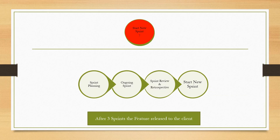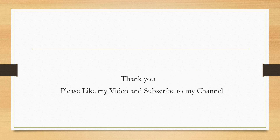The next stage is to start a new sprint. In the second sprint there will be no release planning or backlog refinement sessions. The next sprint starts with sprint planning, followed by the ongoing sprint — which includes the user story journey and daily stand-up meetings — and then a sprint review and retrospective, after which a new sprint starts. From this example, after three sprints, feature four will be released to the client.